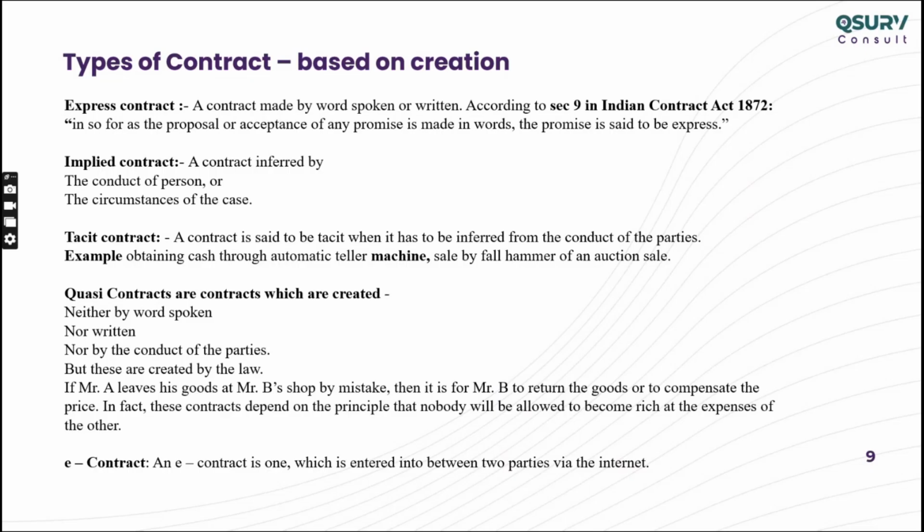A contractor submits the cost proposal for a variation. You didn't approve it, but he started working, and you never stopped him either. So what does your action mean? If you stop him, your action means don't do it. But now you are just watching him doing the work. That means there is a silence, a silent approval from your side.